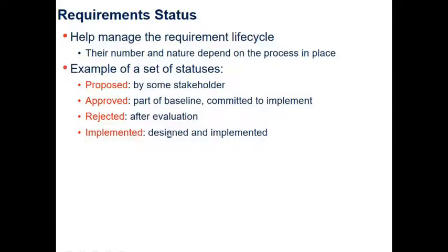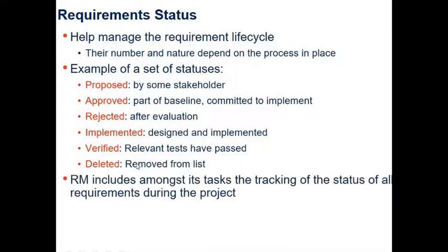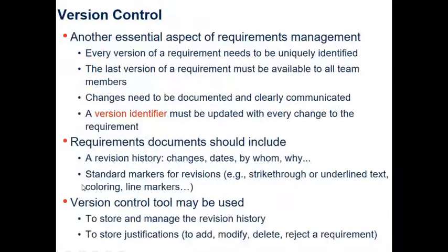Implemented status would be that it's designed and implemented. Status verified would be its relevant tests have been passed. If the status is deleted, it could mean that that requirement has been removed from the list. So requirements management includes amongst its tasks the tracking of the status of all requirements during the project.